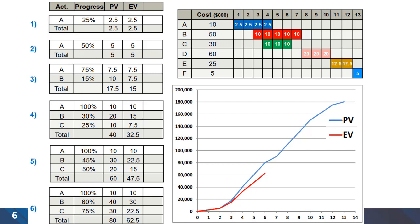Looking at the third time period, activity B is planned to have 20 percent of the budget spent; however, the actual progress is only 15 percent, and the earned value of 7.5 is less than the planned value of 10. This analysis can be done for other time periods in the project.